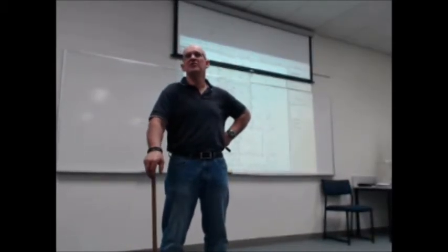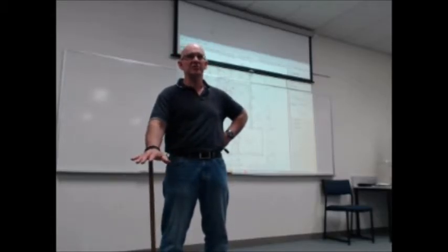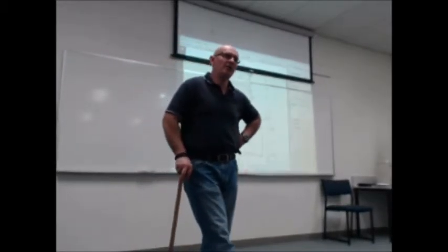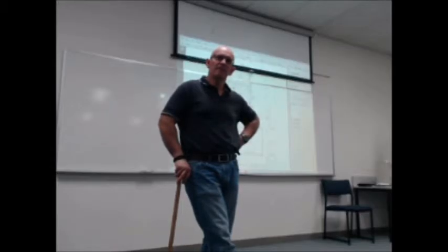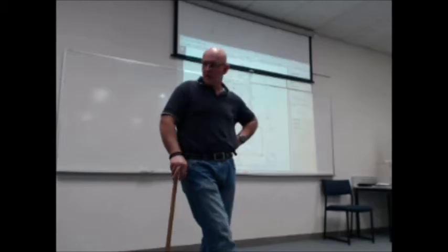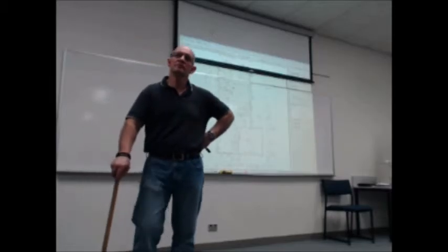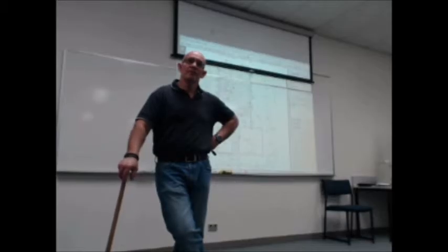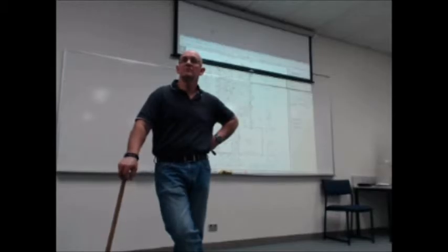Big area, 650 bucks per meter. A big area that doesn't have any tricky things to do drops the price. It depends on how flat the surface is and everything. He'll come in and say, look, this is lumpy as hell, I'm going to have to put a shitload of bloody material down, there are so many anomalies. My tiler was brilliant, he made my work look really, really good. For porcelains he'd be charging $75, and I used to tell the client this is what he charges. But it's going to be a good job, and you never have to go back. I've heard some charging 100. Every number is 100 plus. I'd give you him any day of the week. Brilliant, this guy is.